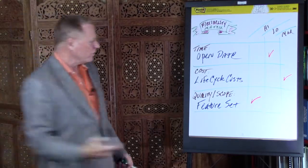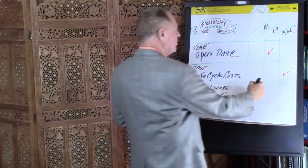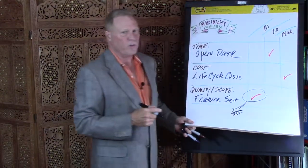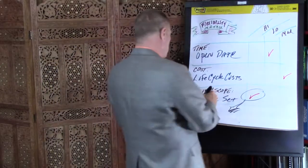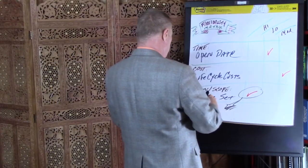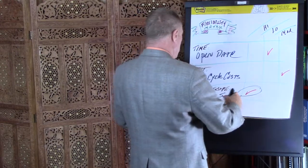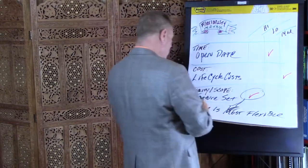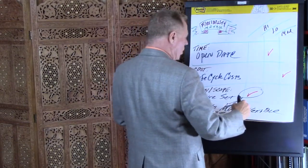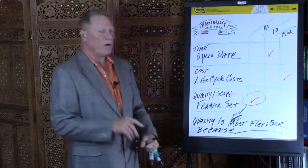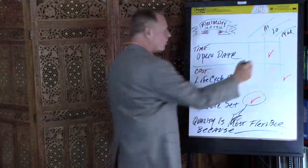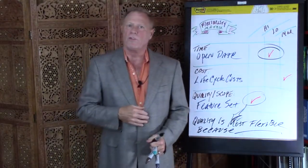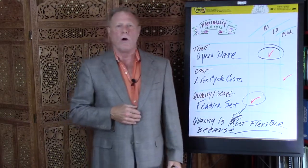We're certainly not done, however. Check marks are not going to resonate with consensus, so we need to convert these back into narrative using a facilitator's favorite word, which is the word "because." So quality, or scope, is most flexible because they don't have to have every feature they want on day one. Timing is least flexible because we can't afford to have people sitting around idle doing nothing. And, of course, that puts costs somewhere in the middle.